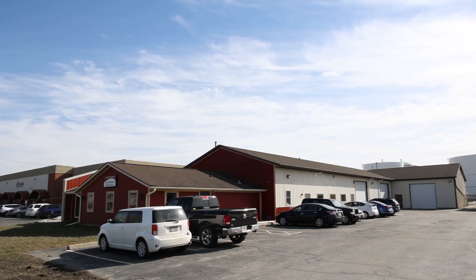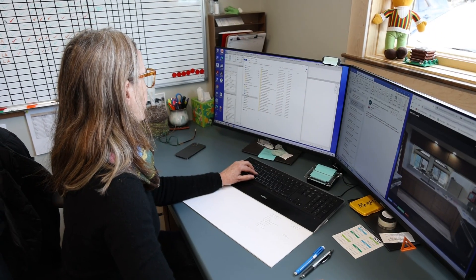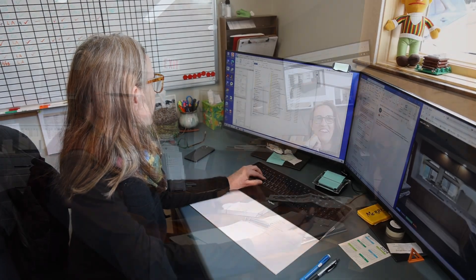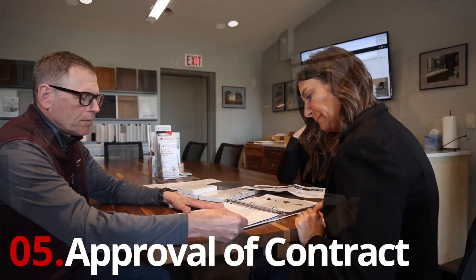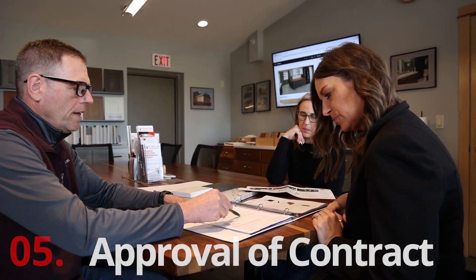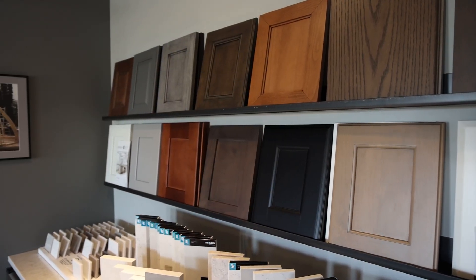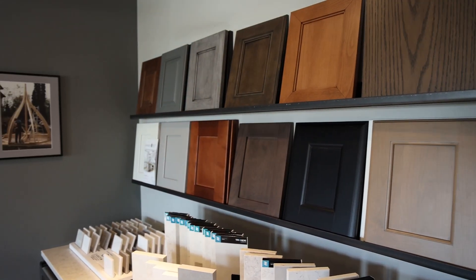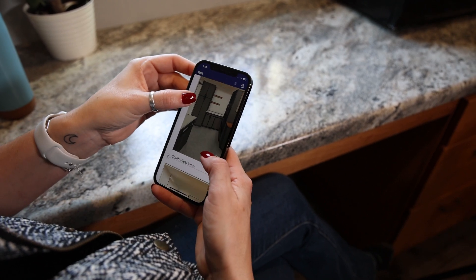Your remodeling contract and any subcontractor proposals are released for your review. A meeting is scheduled for final revisions. The estimator and draftsperson make necessary changes, then send the contract and drawings for final approval and down payments. Once collected, your BuilderTrend account is activated, we start ordering materials, and schedule your project.